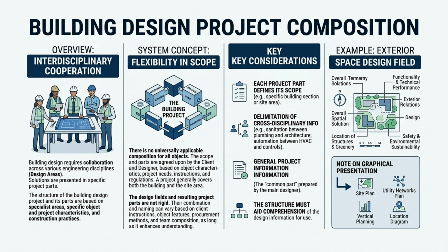The breakdown into design fields and project parts is flexible, not fixed. The composition can be adapted to each project's specifics and the client's requirements. For instance, some components might be grouped or split based on design goals, procurement methods, or the design team's competencies. A clear structure is important. The aim is to make the documentation logical and easy to understand for anyone using the information.